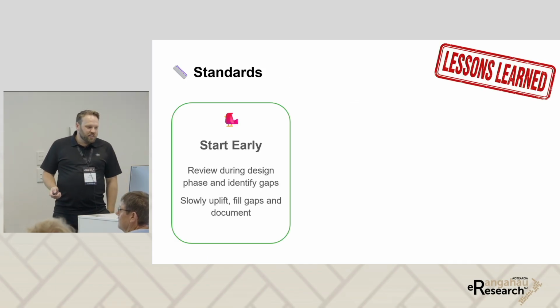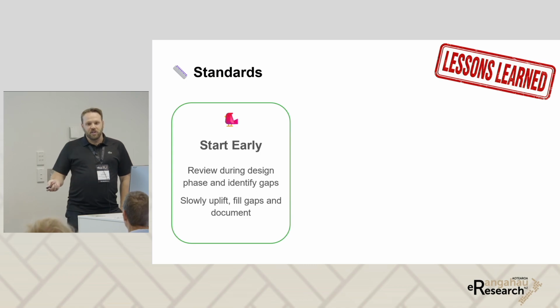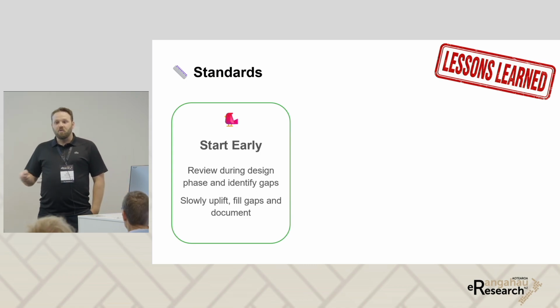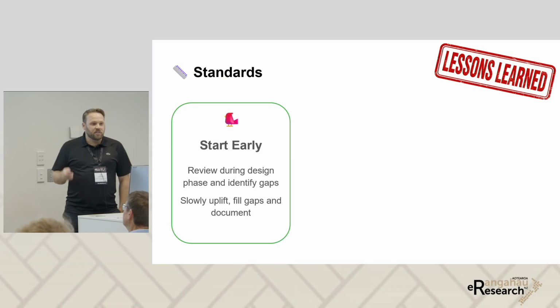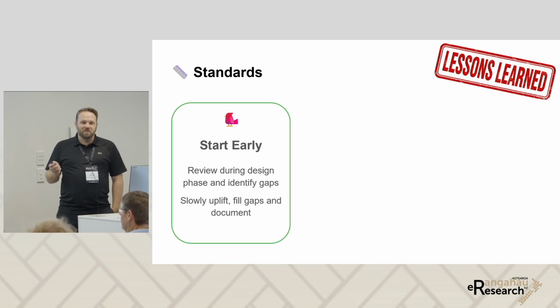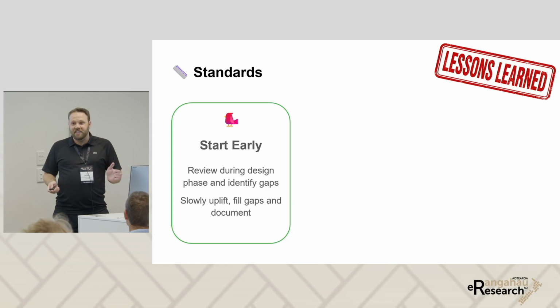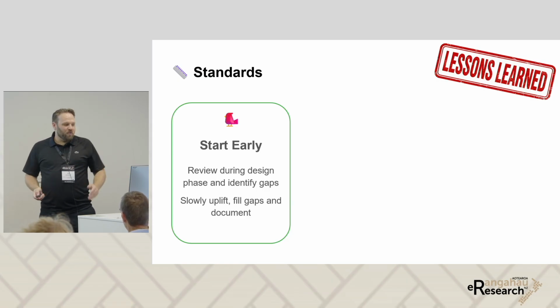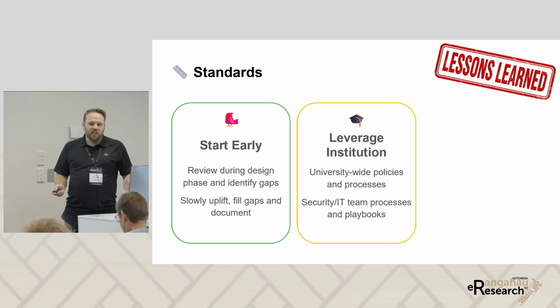A couple of lessons learned, because I think this is an interesting process for us to go through. Maybe we can share some information about what was hard for us and what was easy. Start early is a key factor. We did this during the design phase, and we looked through all the controls and standards. It really makes it easier, and if you're doing it at the end, then it's a whole pile of work after you've already done things.